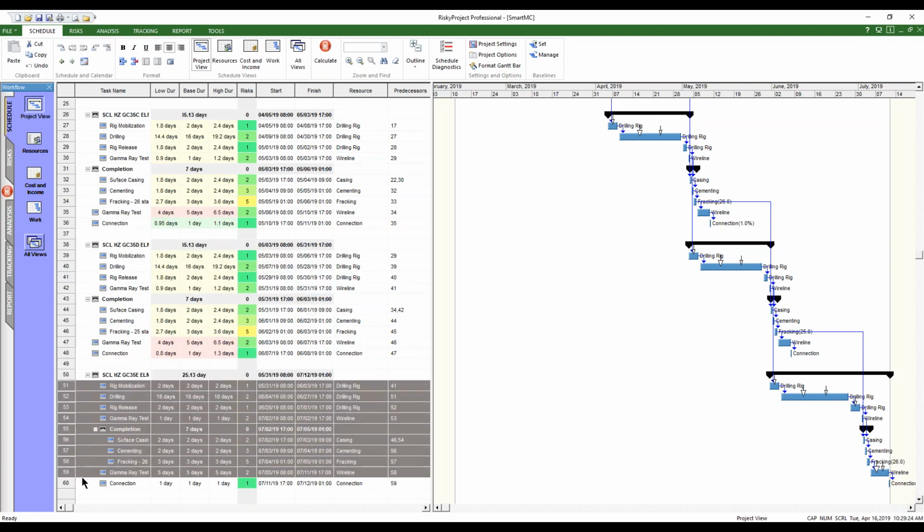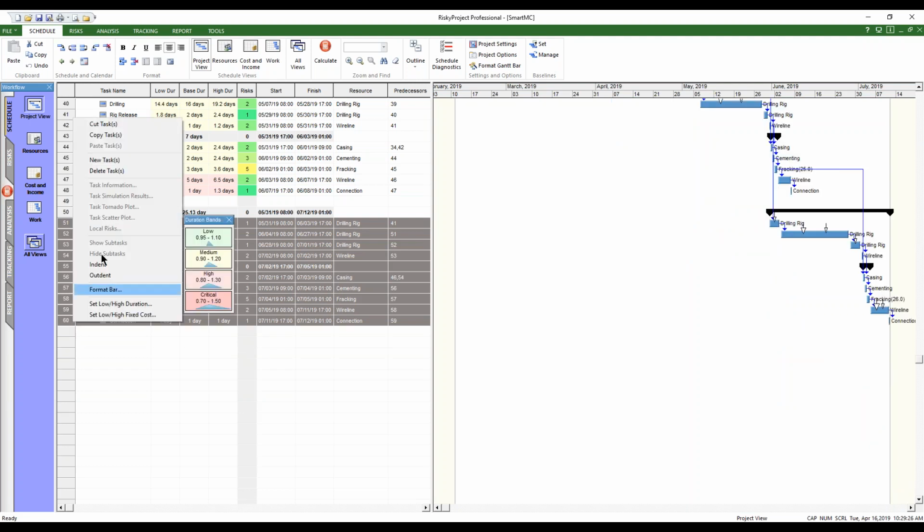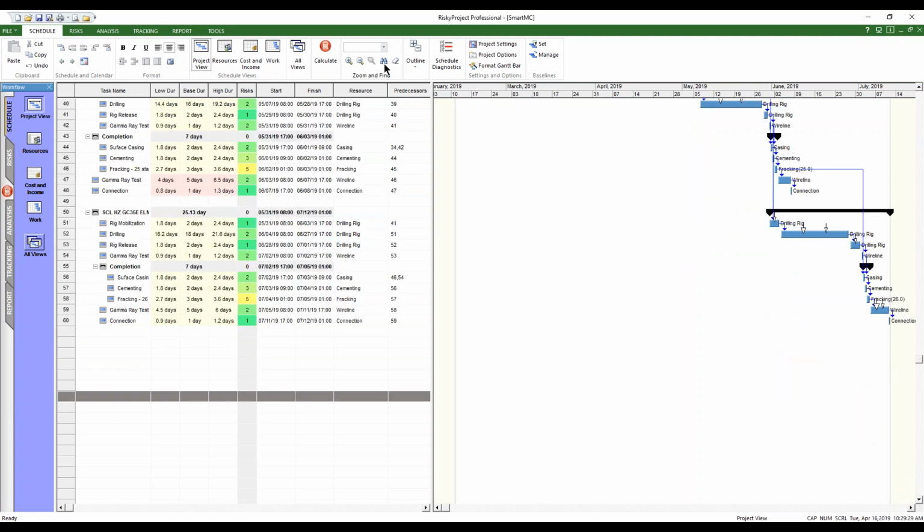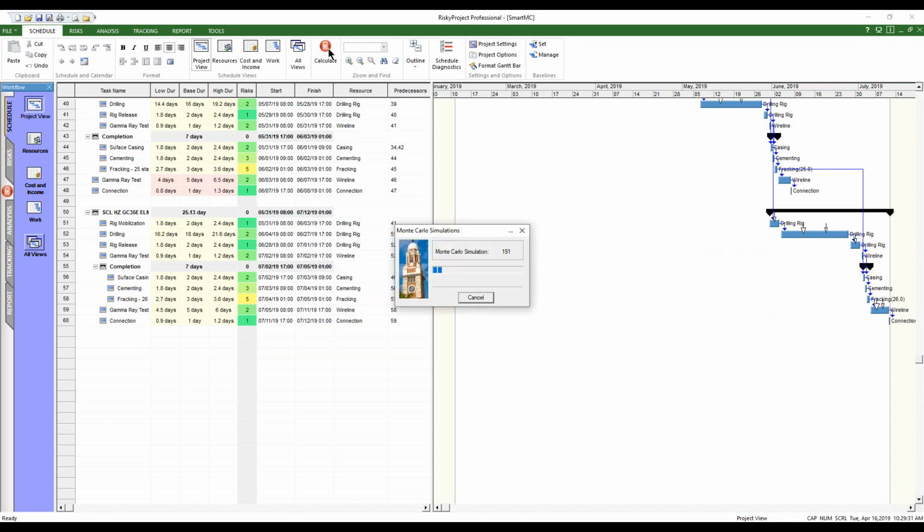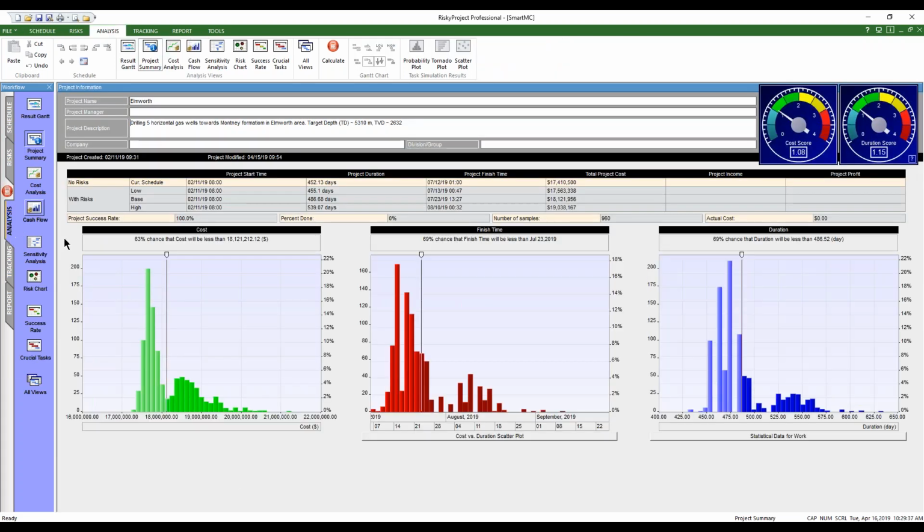And I'm just going to grab the rest, and we'll just say that they're all medium here, just for a second. So then when we calculate that, and we can stop there, we'll take a look at that. We can now see that the uncertainty brought on along with the risk has actually added quite a bit. It is actually about 50-50 on here, even though I hadn't determined that. It's gone from 552 to 5, so it added another 10 days. So it's added almost another 50% onto the uncertainty.